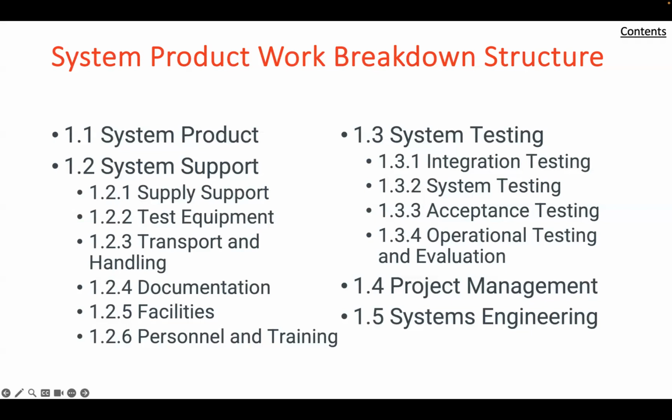Time management is key to cost control, especially if project deadlines are missed, since the longer the project is dragged on, the higher the cost incurred, which effectively means that the budget will be exceeded. Another technique to cost control is to identify the value of the work that has been carried out as the project progresses, an approach commonly known as earned value.